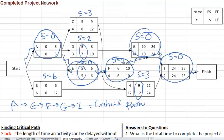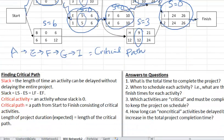So what's so special about critical path? The special thing is that any activity that is on the critical path, we know that is a critical activity and we can't delay those activities. So the activities that are on the critical path are the ones to focus on. They are the bottleneck activities. Also the critical path is the longest path in the network. And that length, length of the critical path is the same as the project duration or the total time for the project.